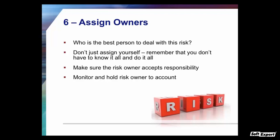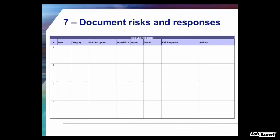The seventh step is to document your risks. A standard risk log lets you log risks with a unique identifier, date, category (resourcing or technology, for example), risk description, probability and impact (high, medium, or low — or scales from 1 to 5 or 1 to 3), the owner, the risk response, what you're going to do about it, and the target date for action. You can download this risk log template from my website's resources page for free.